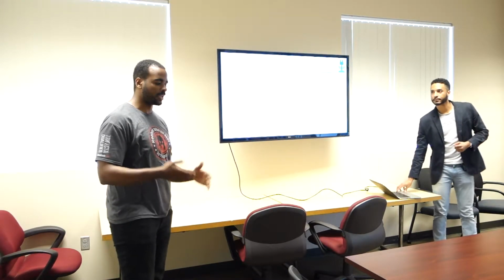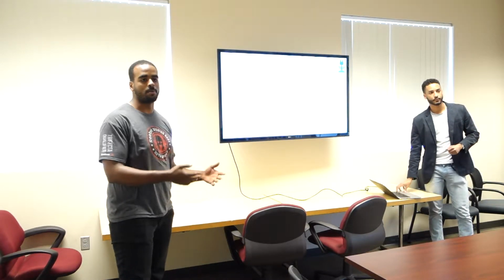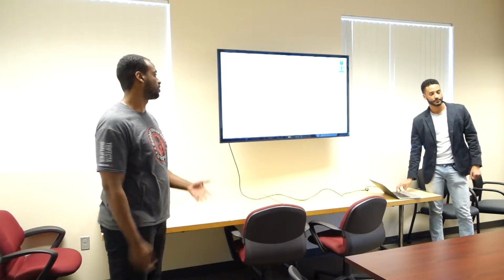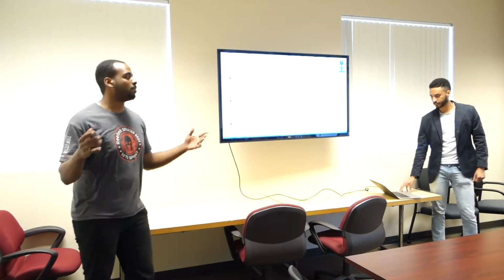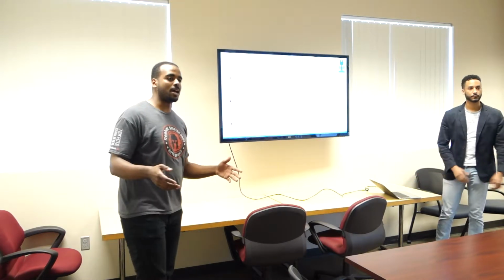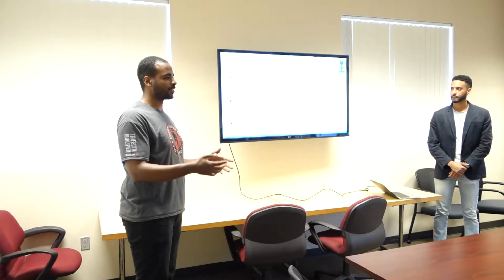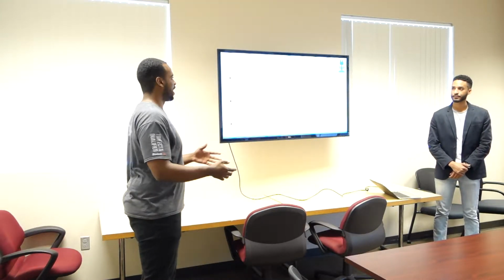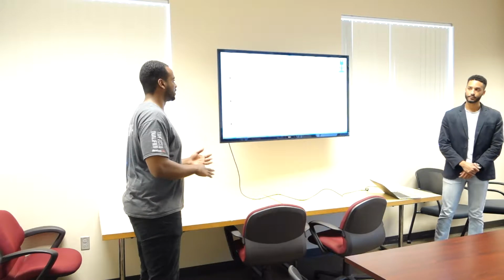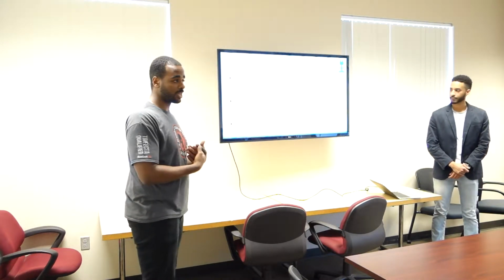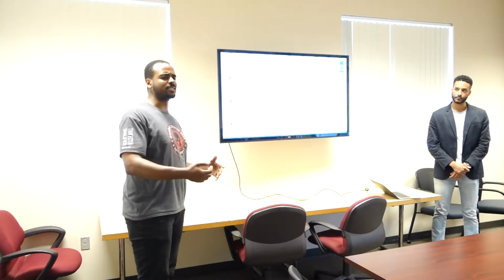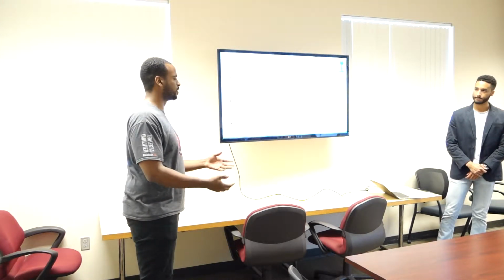So coming into any project, you think one thing, going out of it, you definitely learn a lot. So here I'm going to talk about what we learned from this project. Our big takeaways from this project is that most problems are not technical. I thought it was going to be difficult to deal with all the engineering aspects, but actually not. There's a lot of bureaucracy that was involved in getting data from these utilities that sponsor us, but it would take 6 months just to get some simple utility data about a building or whatnot.